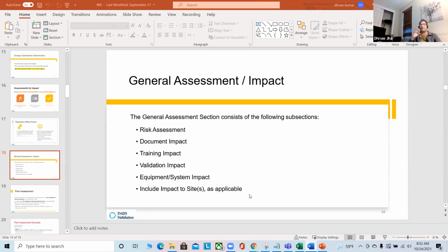So all those impacts you have to think about, and then you have to write it down. Most of you guys might be working on changes, because it's continuously happening in those big systems. Every 3 months, 2 months, you see a new change request and you're working on that cycle. And then you have to create another IQ, OQ, PQ, or you can combine IQ, OQ, PQ, and then that change again, you have to validate. Is that clear? Any question, any confusion here?